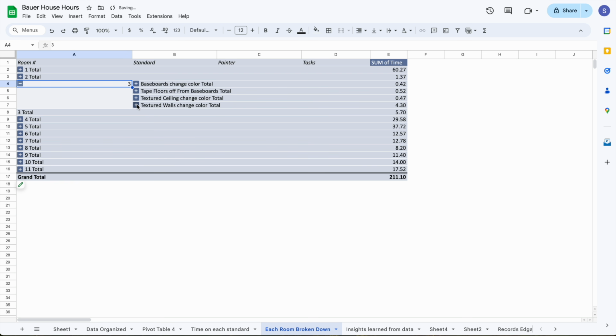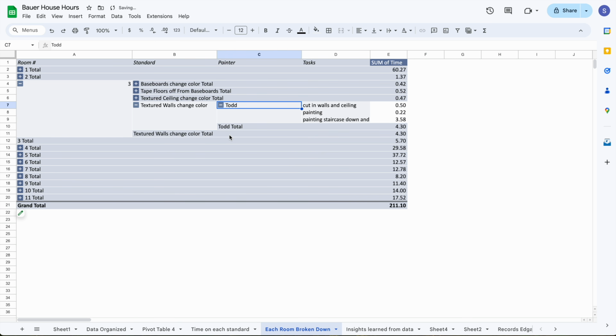You know, if you're 6'6", you're probably going to be able to paint faster than somebody that's 5'6". If you've been painting for 20 years, you're probably going to be quicker than somebody who just started painting a year ago. Between people, it can be really, really big. I'm talking at least 2 to even 3x difference, to where it takes this guy who does the exact same process twice as long as this guy, but they're both experienced, really good painters. So that's where it gets hard to say, well, how long should this take per hour? We refined and changed our standards based on what we saw in reality.